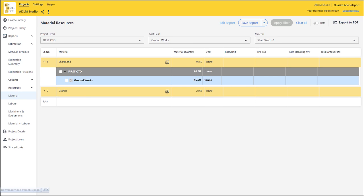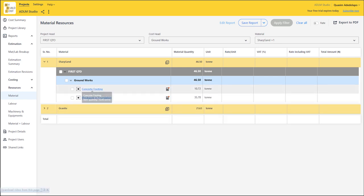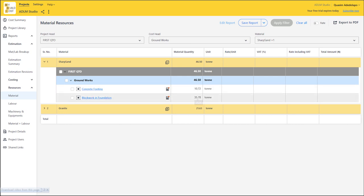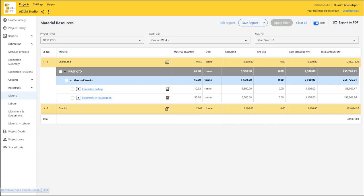If you check where we are incurring the sharp sand cost, it's telling you that for concrete footing alone you are making use of 10.72 tons, while for block work you are making use of 35.78 tons. If you turn the rate on, you can get the total cost. The total cost for your sharp sand here is 255,776 Naira 71 kobo. That is how detailed it goes based on your quantity takeoff alone.